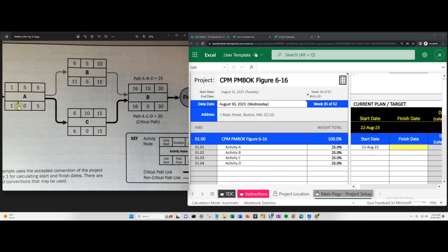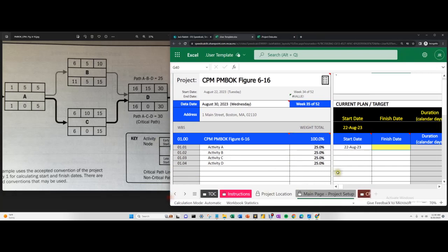We have the start date, which is 1, and then it's a duration of 5 days. This is Excel, right? To make it easier, we say equals this plus 4 more days. That's a total of 5. And then B, so that's 5 plus 1 is 6. So it's the day after is what that means. So we'll say equals the end date plus 1. So the 26th, the 27th is the day after, and it's also 5 days. So we'll say equals that plus 4 more days.